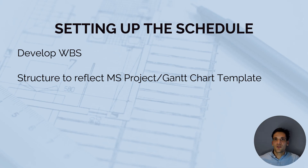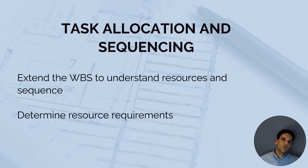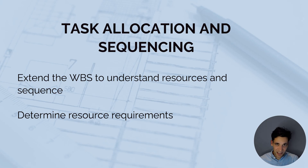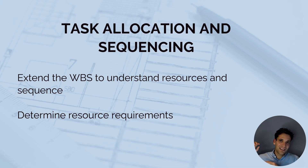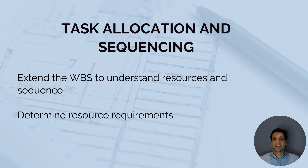If you're using Microsoft Project or a specific Gantt chart template, you want to make sure the data that ChatGPT gives you reflects that structure. Once you've set up the work breakdown structure, you can then use ChatGPT to extend on this to allocate and sequence tasks — to understand the resourcing, the sequence of the different activities, and to determine the resource requirements. So you use ChatGPT to set up your initial list of tasks, then get it to sequence them and tell you what resources you need.